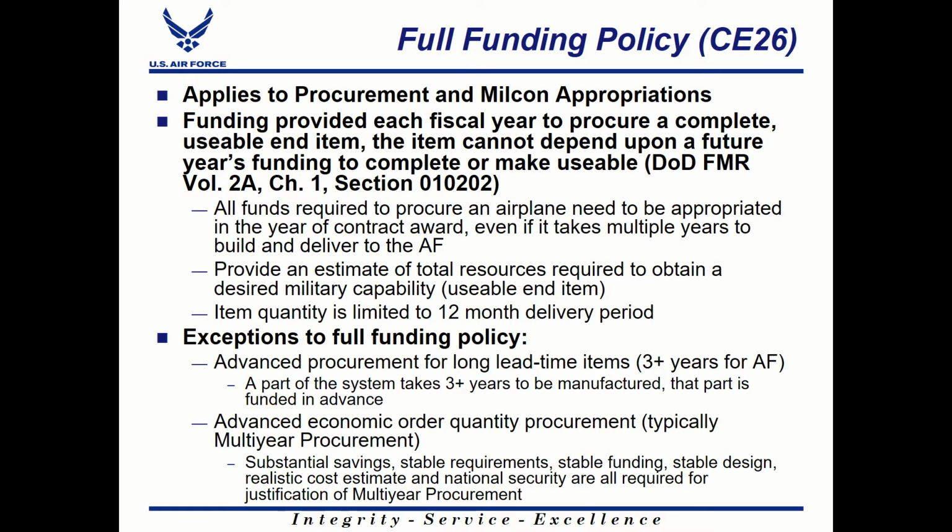So full funding policy, this applies to the procurement and the MILCON appropriations. Funding for full funding is provided each fiscal year to procure usable end items. The item cannot depend on a future year's funding to complete. What this means is that you need all the funding to buy all the pieces and parts that are required to assemble or create something that's usable for the Air Force. Even if the system or the components or the thing you're buying takes many years to build or assemble, you need to still have all the money up front.